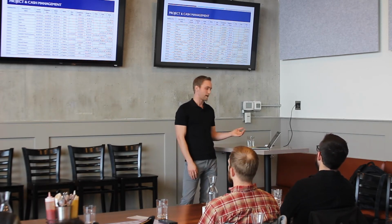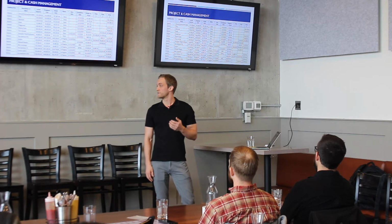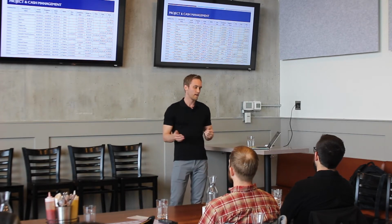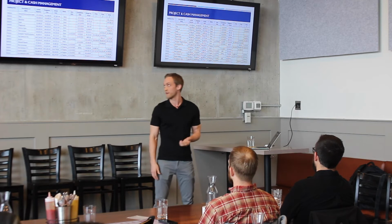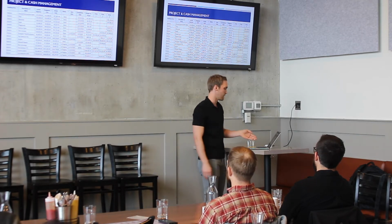So that's something we pay close attention to. We want to make sure we always have enough working capital, because if you run out of working capital and you're constantly waiting for the lender to fund, you'll quickly turn what would start as a 12-month project into 24 plus months, and it'll really crush your returns. So we're paying close attention to that.